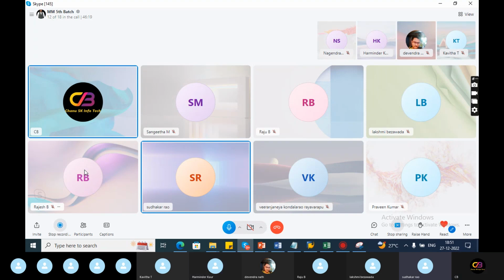Any servers we have to procure, everything we have to finalize in this phase. Then we will go to the business blueprint phase. In the business blueprint phase, it is a phase along with a document. Here we have to study the existing business scenario, the client's existing business scenario, which is the as-is. So we have to map it with SAP, which is the to-be mapping. Then after completion of the business blueprint, we go for the realization phase. Here we have to do various types of configurations like material creation, vendor creation, all these things.